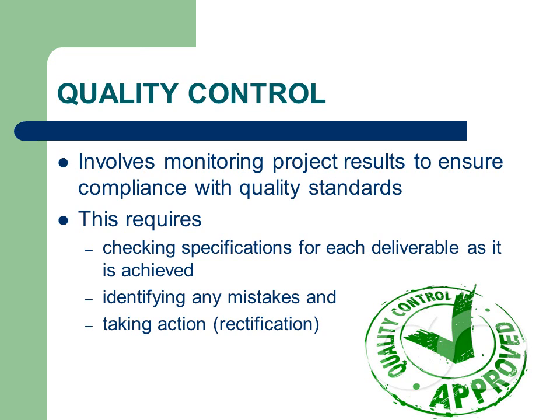Quality control. Quality control involves monitoring specific project results to determine if they comply with relevant quality standards, and identifying ways to eliminate causes of unsatisfactory results. It should be performed throughout the project. Quality control is the actual act of applying the quality assurance processes of checking or testing against predefined quality standards. Any defects or mistakes that are identified must be rectified. The results of the quality control processes must be documented, as they are input to the final approvals when the deliverables are handed over to the customer.